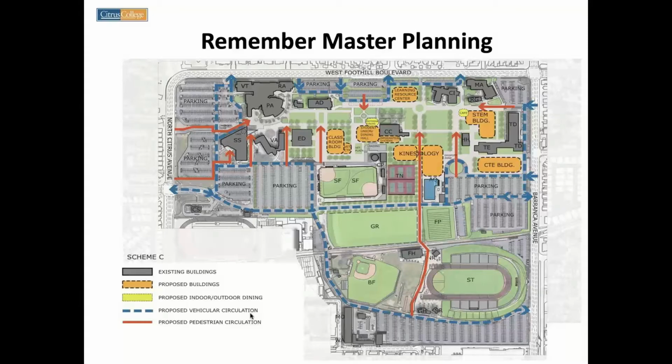They would be raised, and now you're free and clear to put your STEM microcampus on board, do the build out on that, and then that brings up the next buildings that would be raised, thereby, again, no more bringing swing space on board, and then it just goes from there down.